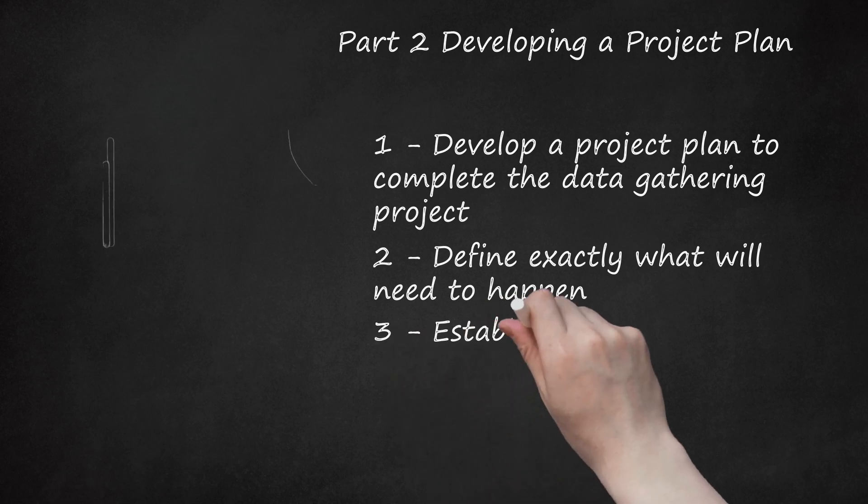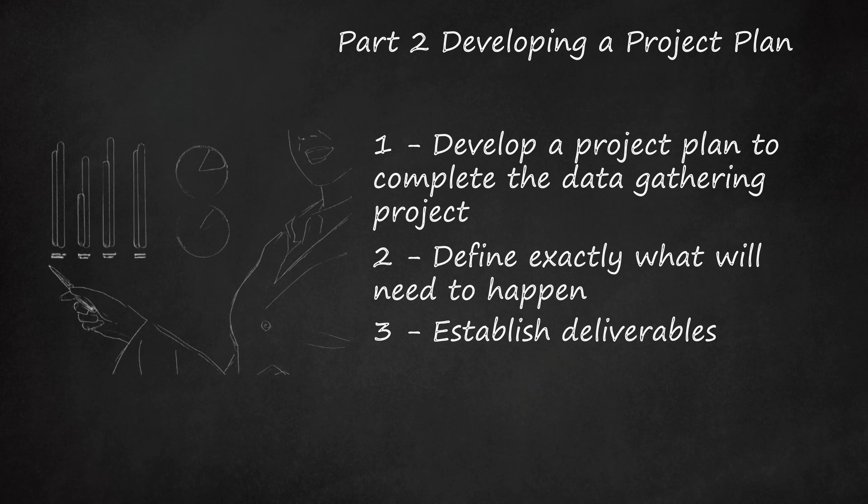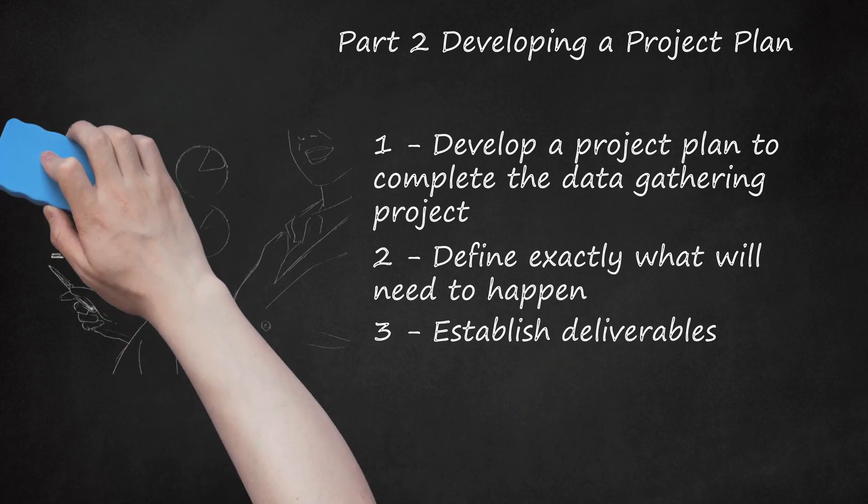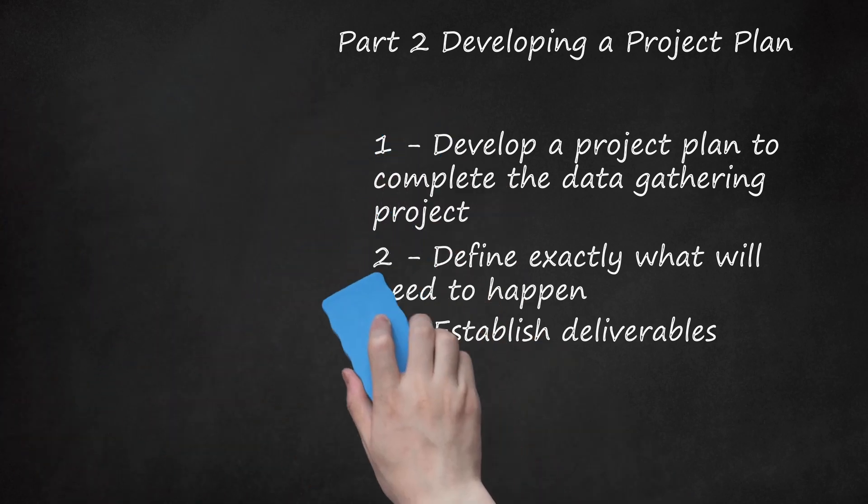Step 3: Establish Deliverables. Your only deliverable in a data gathering project is a report of the current situation with past trends, along with projected consequences if status quo remains. If the business problem given to the team asks for data on projected solutions, these would also be included in your deliverables.